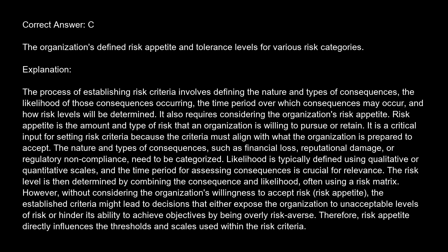The risk level is then determined by combining the consequence and likelihood, often using a risk matrix. However, without considering the organization's willingness to accept risk, its risk appetite, the established criteria might lead to decisions that either expose the organization to unacceptable levels of risk or hinder its ability to achieve objectives by being overly risk-averse. Therefore, risk appetite directly influences the thresholds and scales used within the risk criteria.